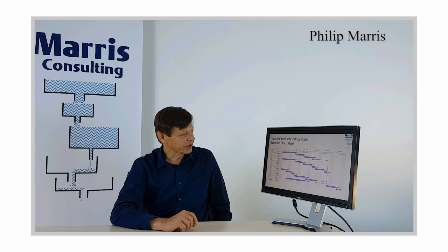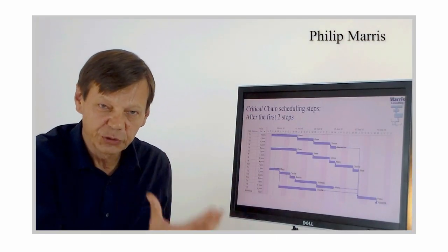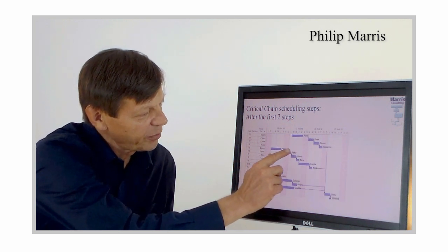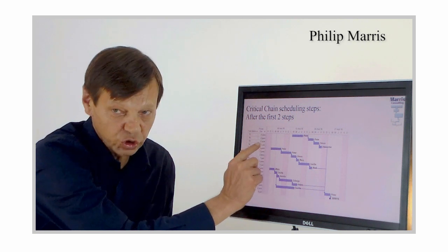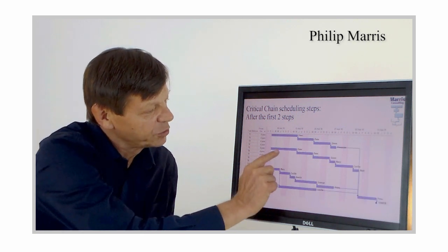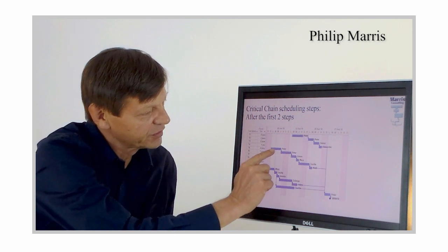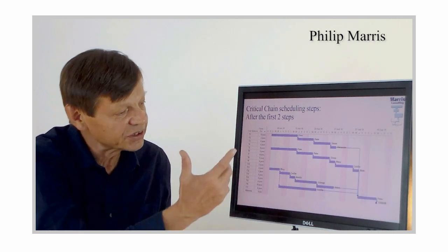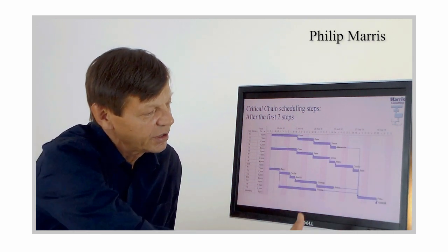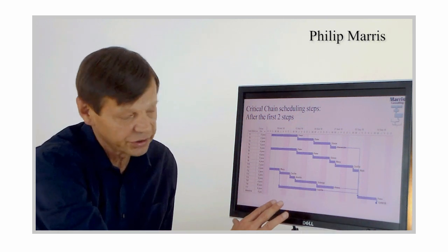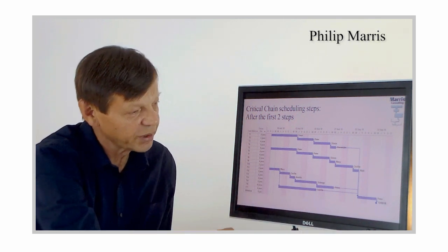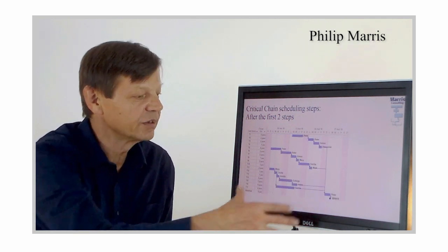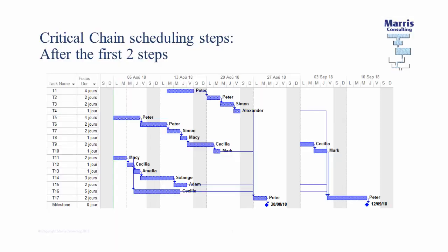So, in this particular example, just to summarize, if we apply the first two steps simultaneously, this is what it looked like before, right? Peter had to do this and it took that much time, and after we remove the safeties, it's a lot shorter, okay? And Peter was doing several things at once, but now he's no longer doing several things at once, and it's been sequenced, okay? The sum of those two things depends on projects, but in this case, as you can see, the planning is shorter than it used to be, right? Because you did shorten all the times by 2, that's made it shorter. It's true that you've leveled, which will make it longer. Between what you've lost and what you've gained, you get something that is shorter. So those are the first two steps.